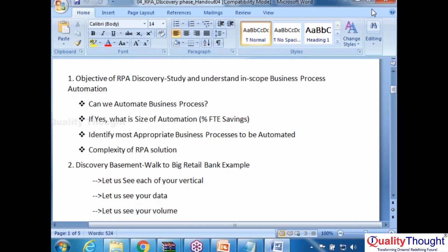So that's why you have to do process-wise discovery, analysis, and you have to propose the percentage of automation benefit. Then the client will prioritize based on his budget and criticality. The client will tell you, okay, automate these 20 processes using Blue Prism or Automation Anywhere. The primary purpose of the discovery phase is, question one, we decide: can we automate the process or not?